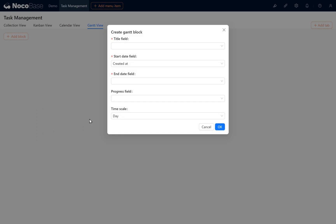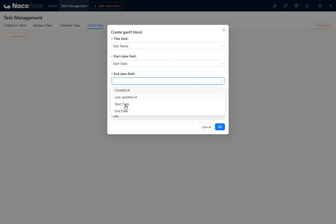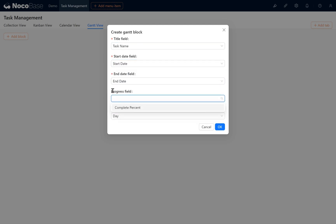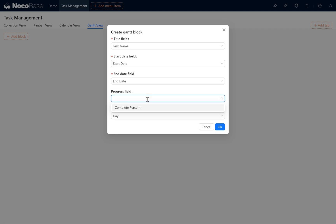Choose Task Name for the Title field. Plus Start Date and End Date. We also select the newly added field. For Progress, pick Complete Percent. Set Timescale to Day. Click OK.